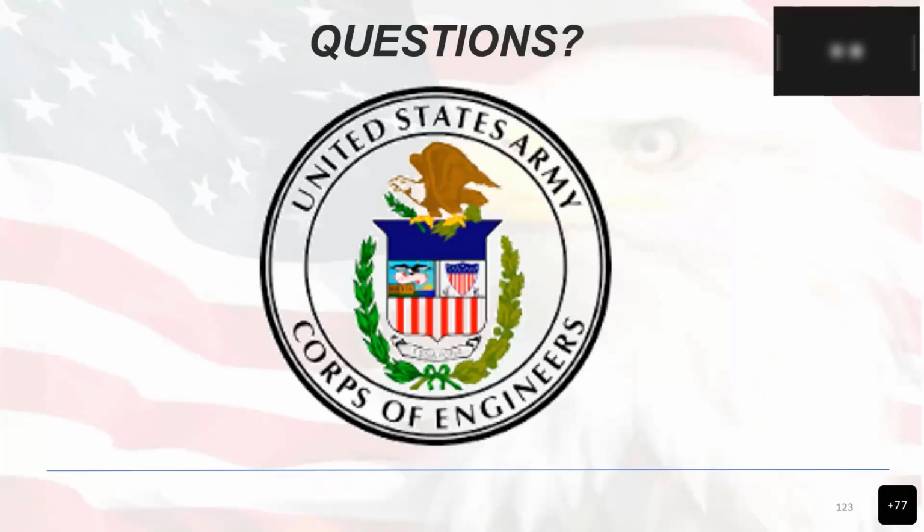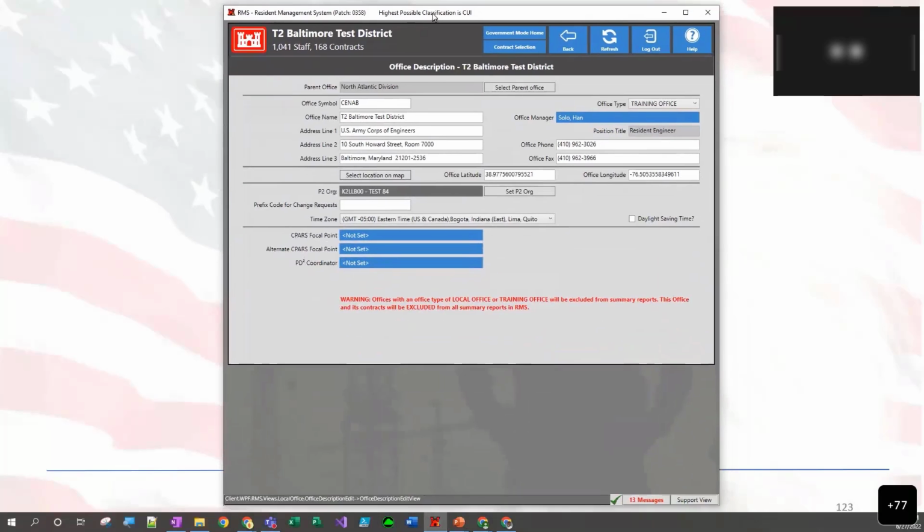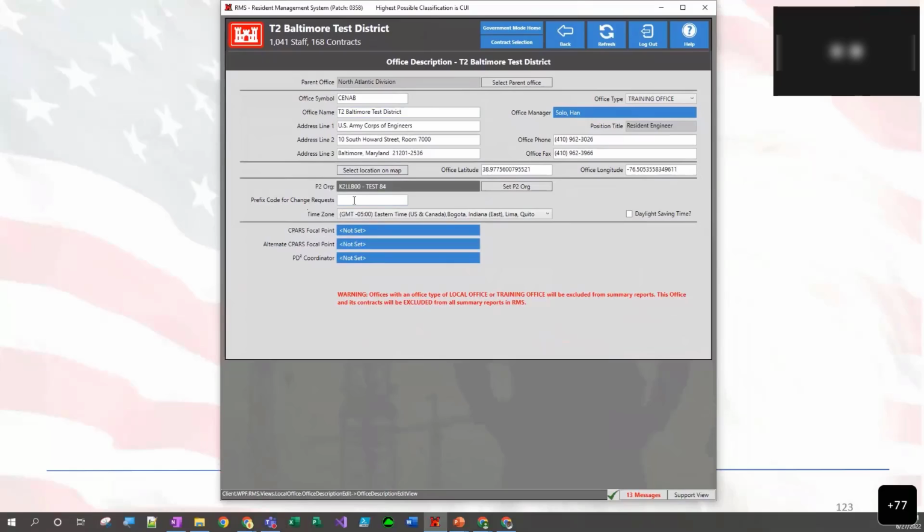And of course, you need to have the RMS codes, the RMS underline A underline contract, RMS M underline milestone codes. The status of the project needs to be open. The dollar amount, you need to have more than 1 cent. If it's 1 cent or less, it will be ignored by RMS. So the task resource amount needs to have a value, some dollar amount. And so those things need to be set. Once that is set, they should be brought in automatically.